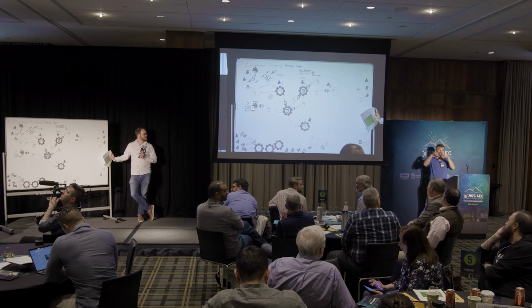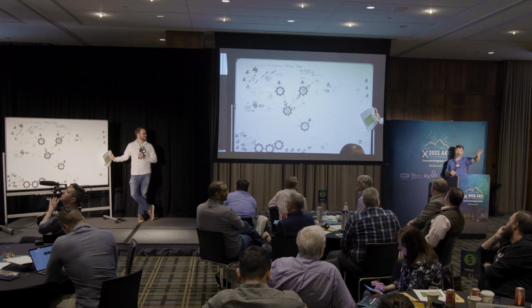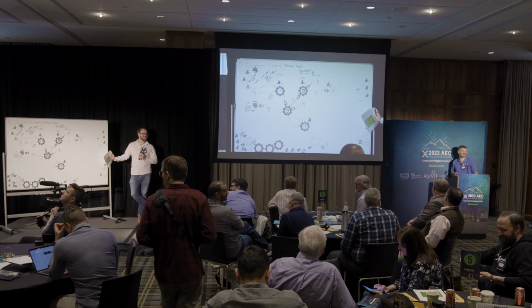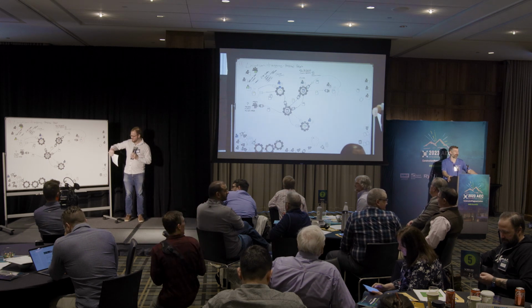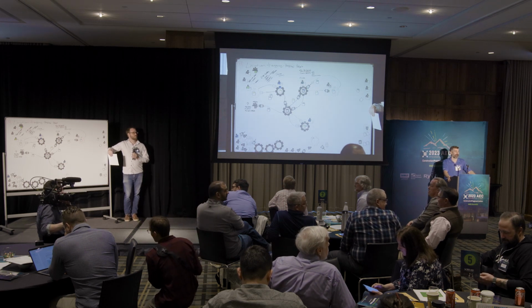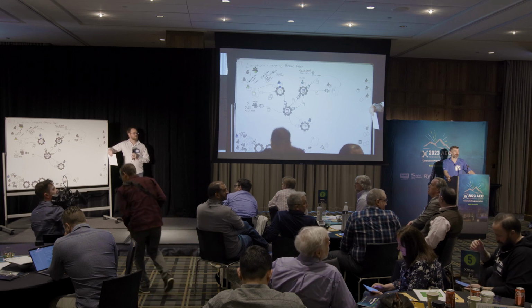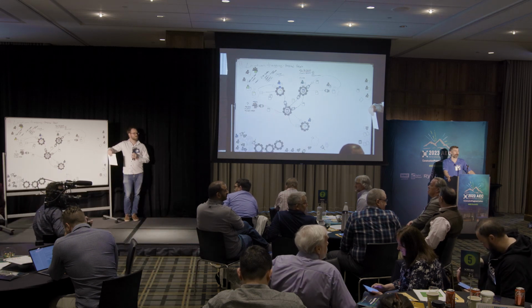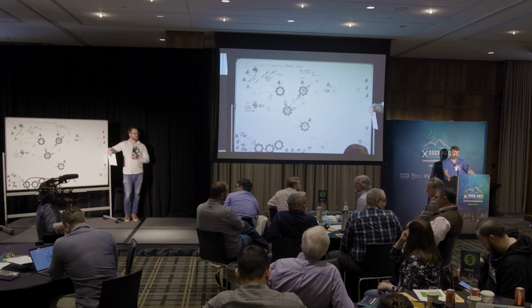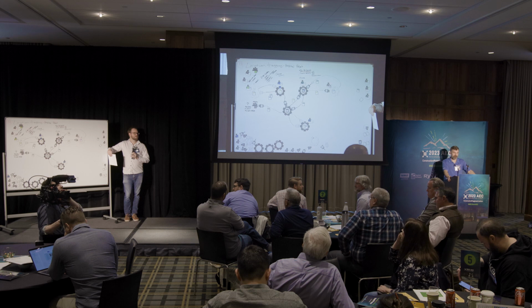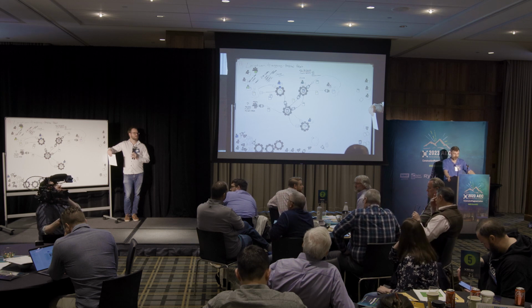Do you create a new one, or do you move the wall and create a .1? Yeah, that's if you guys want to have that discussion, I'm just saying that's the other problem with it as well. I didn't look at it when the RFI came out. I look at it after the wall's in place, it's one side, some systems are going in place, and now I'm like, oh crap, we didn't know this RFI changed it. Now we've got to write another RFI for another change for that. And so that's why one RFI can lead to 10 RFIs.